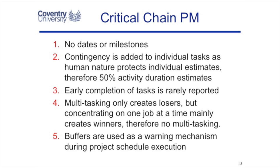Here are five concepts of critical chain project management, and we'll be looking at each of these in detail in the subsequent slides. The first concept is that we're not going to have any dates or milestones. We're not going to publish any dates or milestones because they're going to change, so we're just not going to ask for them.